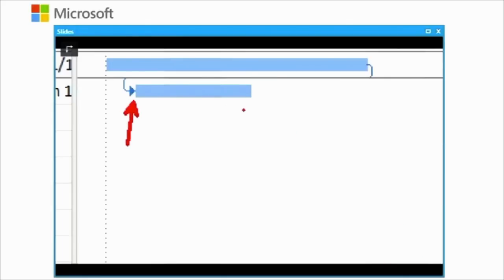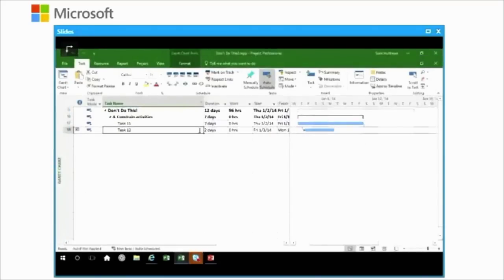If there were any tasks that were to follow the one that we just constrained, they don't know about the changes. In an unconstrained schedule, they would be pushed out as far as this task, and the task itself would be pushed to the right of the predecessor. So we would see instant changes to the sequence and to the duration of the tasks that are involved. When you wire it into the timetable or time scale, this is what occurs. The task, for those of you that are further into project management, is determined critical, float is removed, and so is flexibility. Constrain activities at your peril.